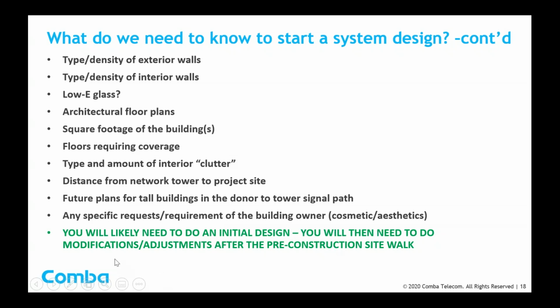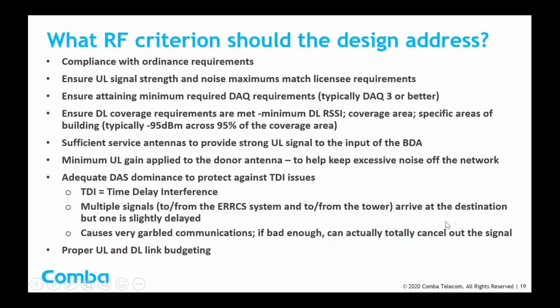The other thing to know is you will very likely need to do an initial design. Then you'll need to modify that design and make adjustments after the pre-construction site walk. And one of the other slides I have here in a little bit will describe what I mean. What RF criterion should the design address? Obviously, compliance with everything that's required in the local ordinance.